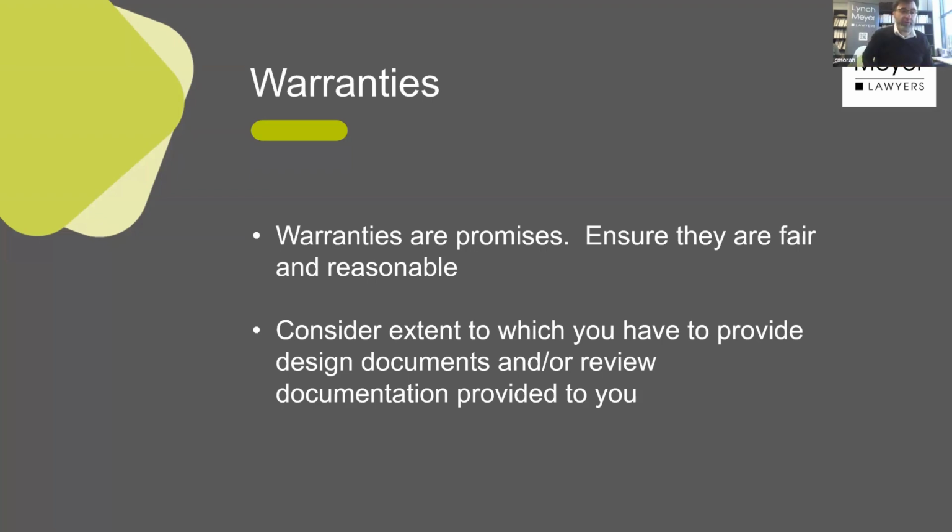Now, if you don't do design work and you just do construction work, if you're just doing the welding, often you won't get insurance, is my understanding. You only really get insurance for design work. But as I understand it, interesting new insurance products come in, and insurers will find a way to avoid liability if they can. Not denigrating insurers too much, but they won't pay out unless they have to. One of the reasons they often don't pay out is if you've agreed to warranties that go beyond what's fair and reasonable. And one of them is, of course, potentially fitness for purpose clauses. So watch out for those.